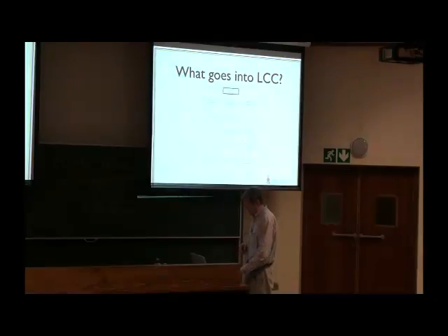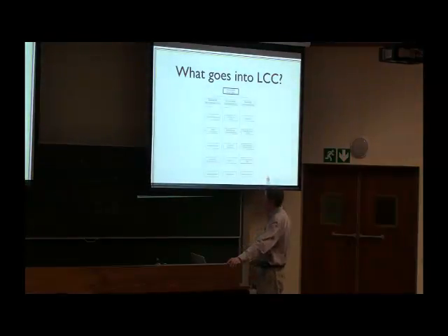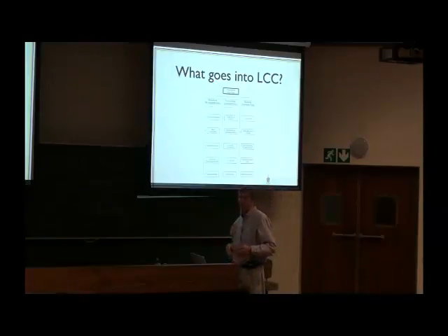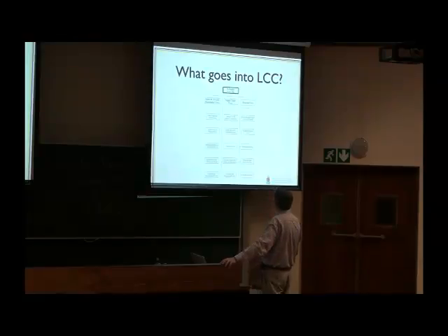And then one has this acquisition cost tree. There you have the three types of costs: research and development costs, non-recurring investment costs, and recurring investment costs. And you have sort of checklists to make sure that you get to all the costs that are involved. So you must think about each of those little blocks when you go along. Okay, so they are just brain products, those blocks, checklist. So that is the acquisition cost, and there is the sustaining cost: scheduled and unscheduled maintenance cost, facility usage cost, disposal cost. So again, you go and use that as a checklist.